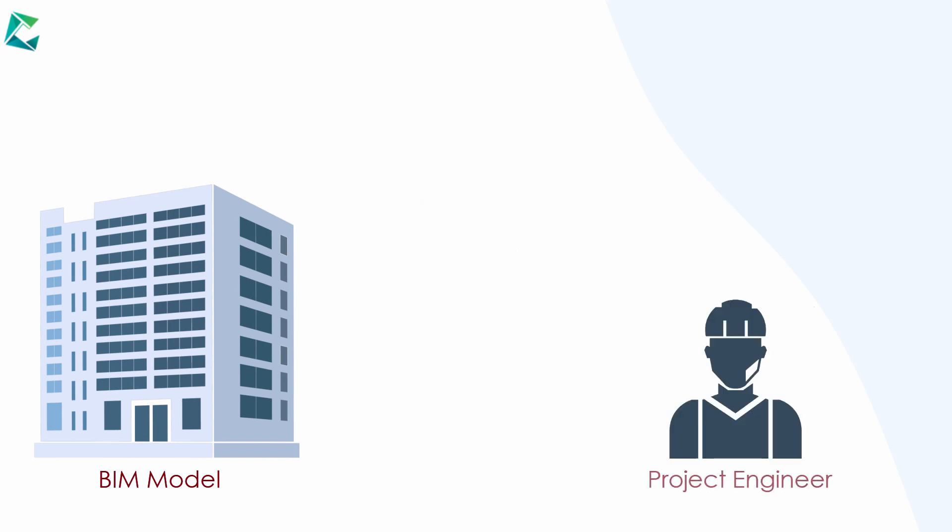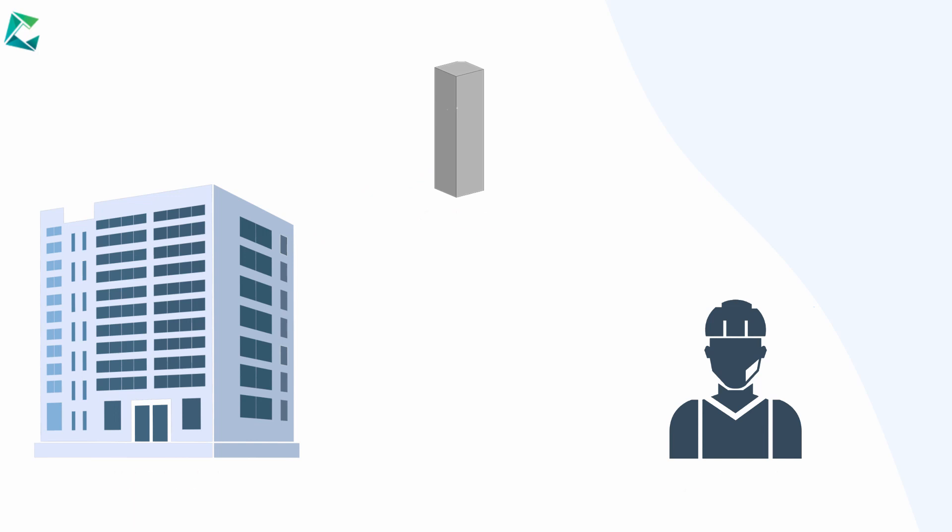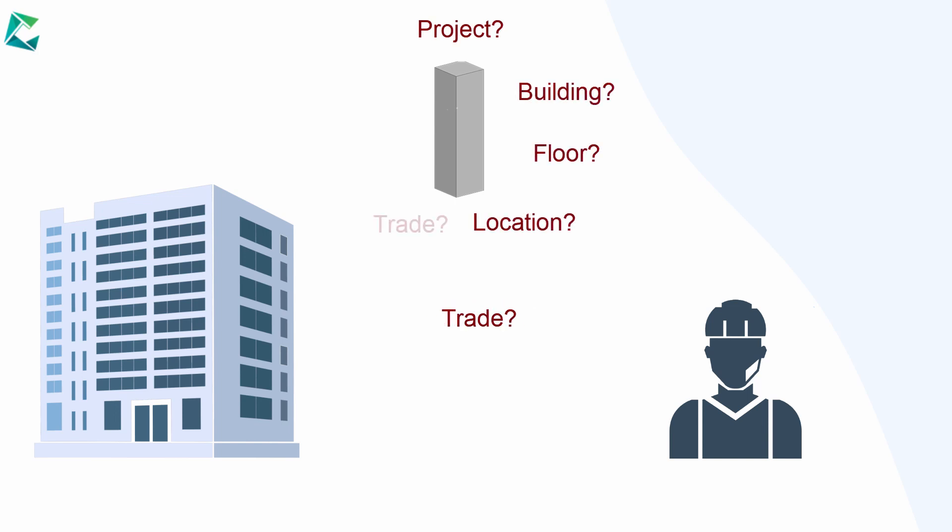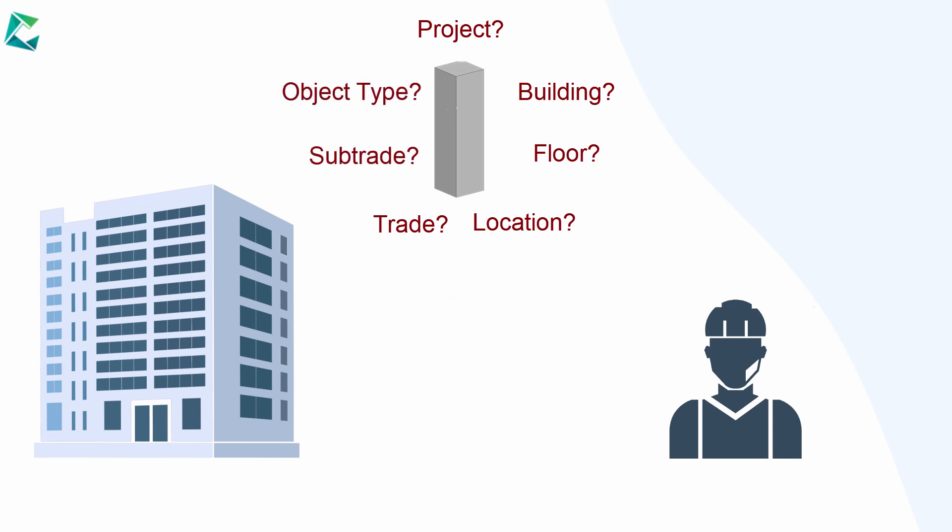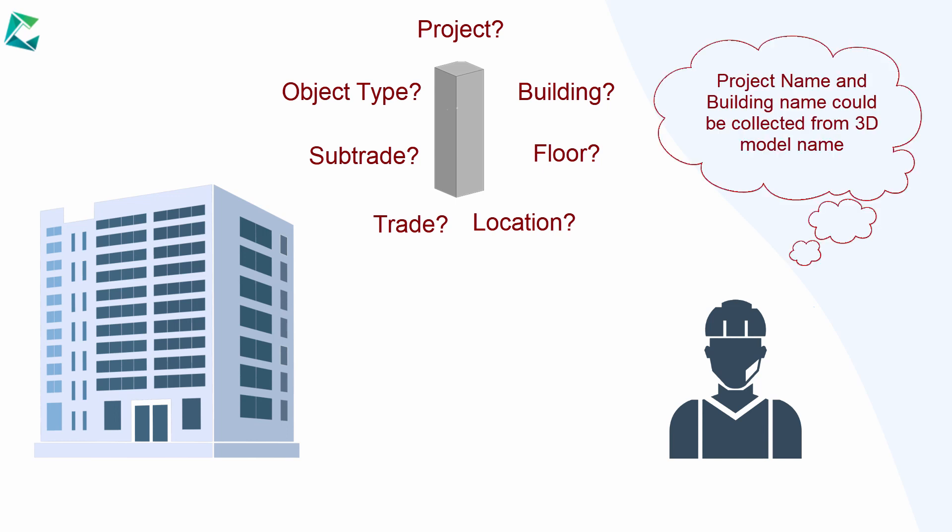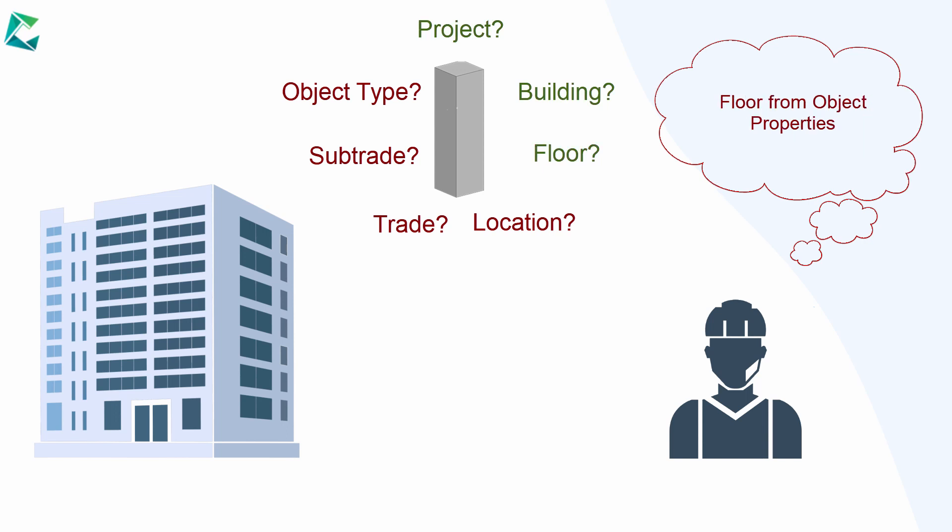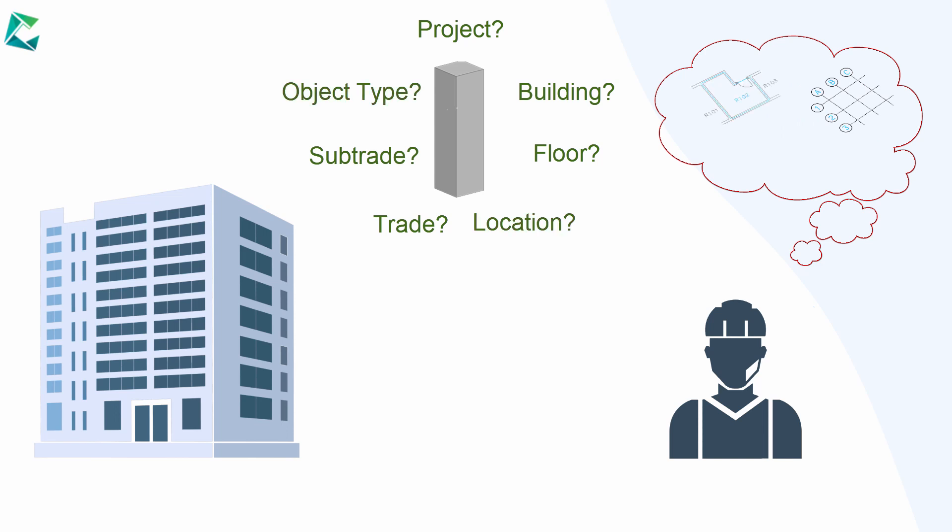When a site engineer, planner, or BIM engineer inspects a 3D object in a BIM model or report, they need to know essential information about the object such as project name, building name, floor, location, trade, sub-trade, and object types. Some of this information may be available in the 3D model but will have to be collected from various parts. The project name and building name can be collected from the model name, floor name from object properties, and trade and sub-trade may be defined by comparing multiple properties. Some information like location or room number may not be available in the 3D model.